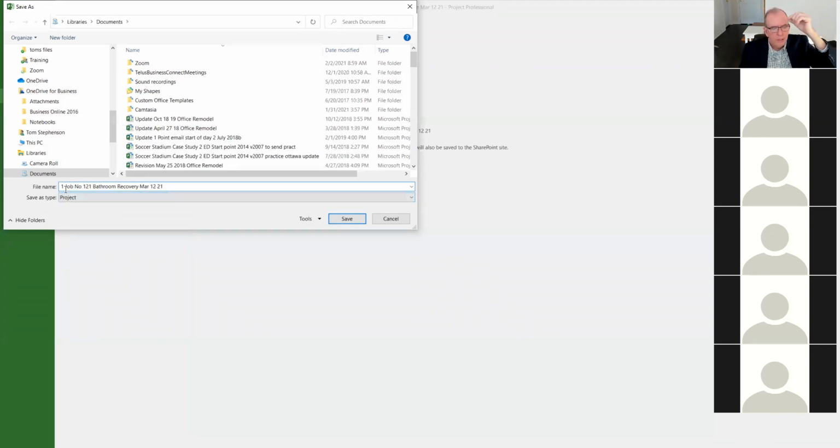So if you could imagine, if I had a project that was 24 months long, with one folder for that project, I would have the first update. If I had it sorted numerically, it'd be number 1. So it'd be 1, 2, 3, 4, 5 for every month. It'd be nice and clear. I could go into any month very quickly. I could find it very quickly and it'll be there. So it's very nice to have a file naming protocol for that. And that makes it very, very helpful to track it. So I'm going to save that.